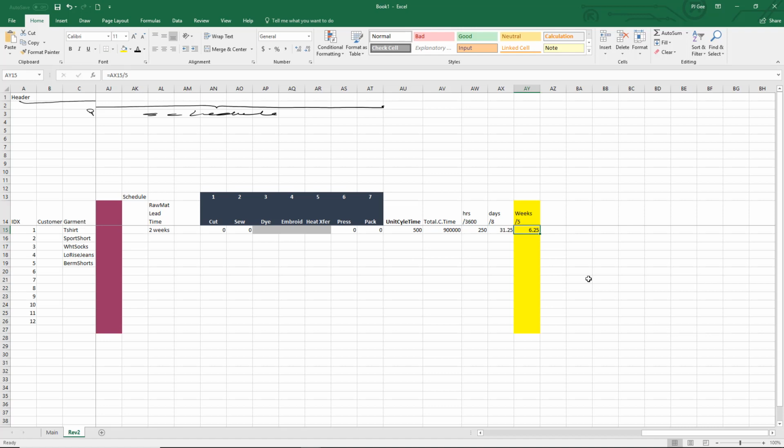Now, that's saying that we have to spend almost the entire delivery time only on the production floor. That doesn't include 2 more weeks here. How long does it take for shipping? Usually I would put in here nominally, if you've scheduled well, it'll take 2 weeks.